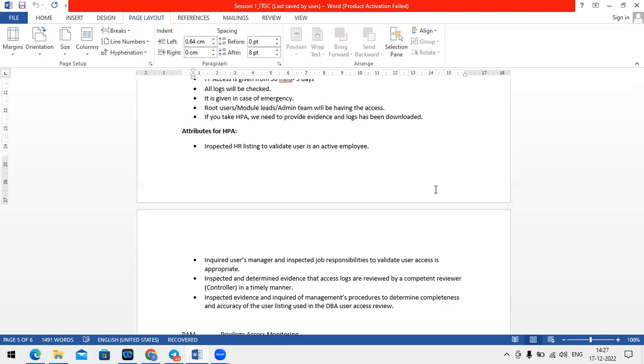It will also have a plan start date and plan end date. Once every stakeholder approves it, they will implement that particular change only between the plan start date and plan end date. If you implement a change outside the plan start date and plan end date, it is considered an unauthorized change. Based on that there would be complications, and somebody might have to take action on you if you try to implement any change outside the change request or change window.